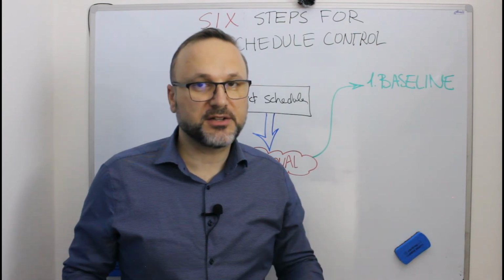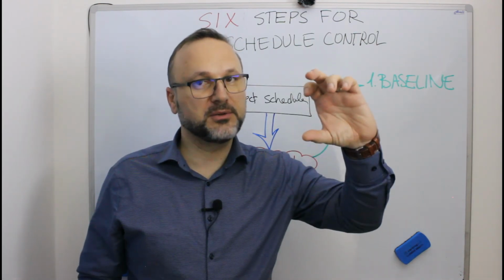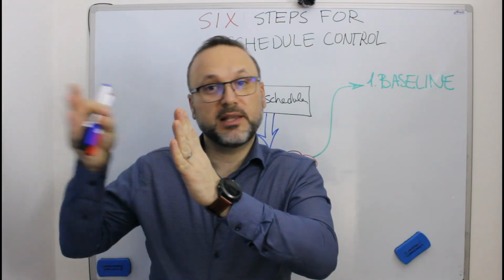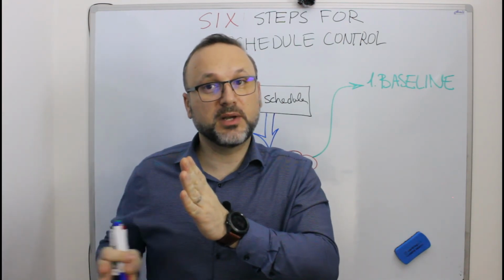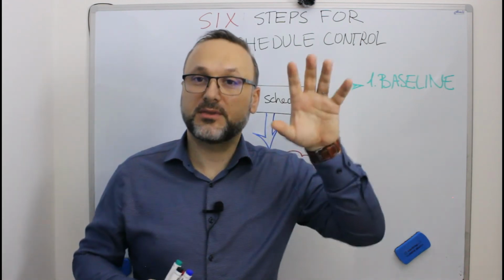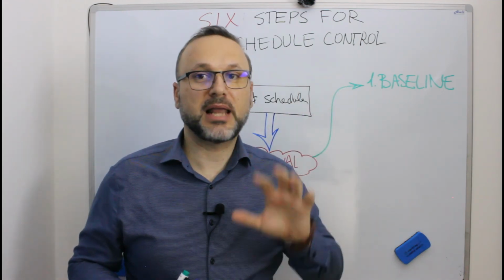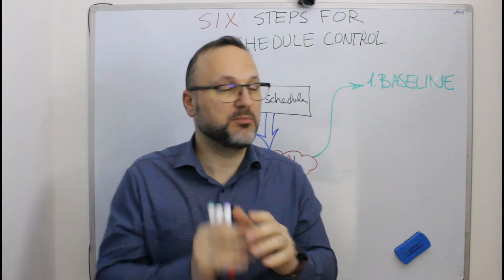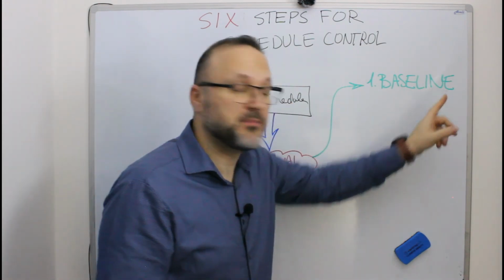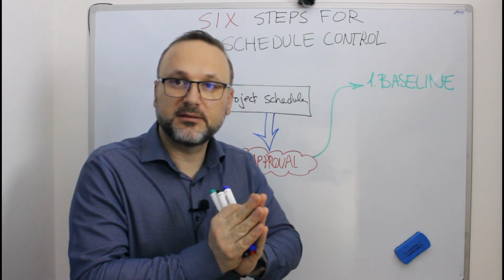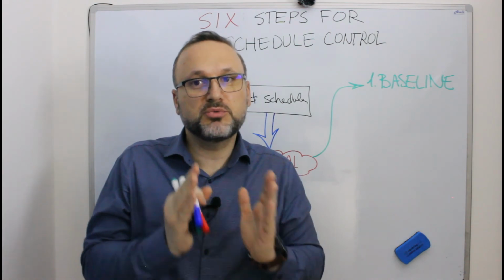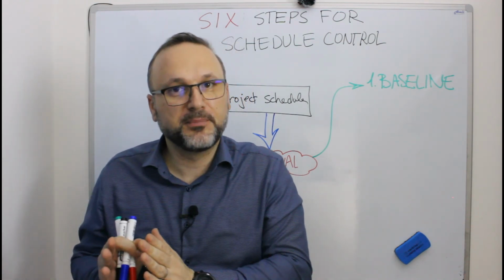The activities are set, the milestones are set of the project, and the durations are set, as well as the scheduling and linking of the activities, same as the resources set in the project schedule. Everything is set now because there is a baseline. So you make a baseline, and once you have a baseline, then you are ready to make the next step.